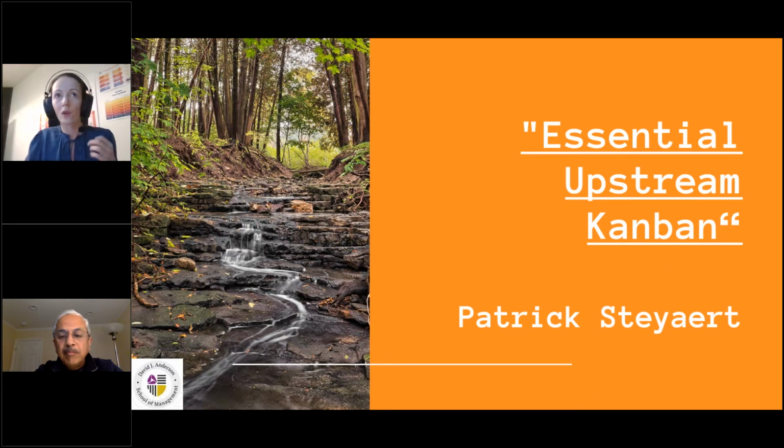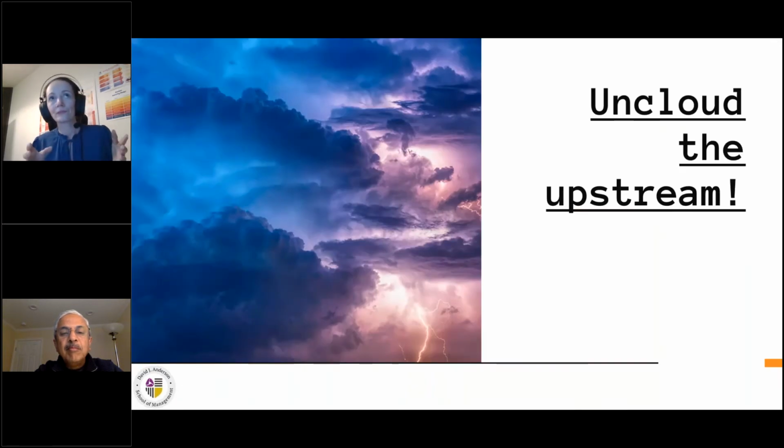And when you think about the upstream Kanban or discovery Kanban, this is everything before the commitment point, okay? So before this commitment point, we have some pool of ideas. There are some requests that some people, maybe customers, not necessarily customers, drop into this pool of ideas. And then there are some people who do some work to define requirements and finally developers can pick up from the top of the backlog and deliver the work.